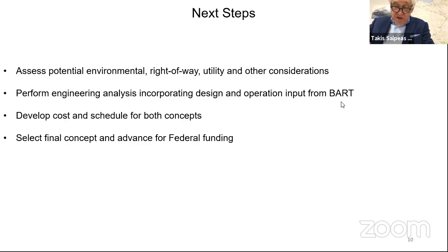Get all these things together, do a risk assessment on the cost and the schedule, and provide the input to advance the federal funding. That is my thinking here, and we are ready to answer any questions, Madam Chair, you and the board may have. Thank you very much. And Carl, thank you for joining us today.